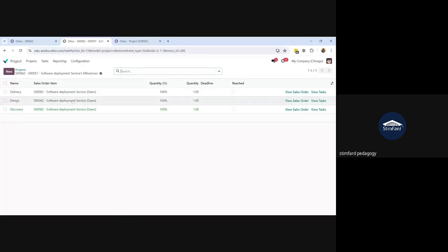So let's say I have agreed with my customer that 2000 would be invoiced with the first milestone, then 2000 will be invoiced after completion of the second milestone, and 1000 will be invoiced after completion of the third milestone. So we have to calculate the portion for 2000. So let's say I'm going to the calculator.